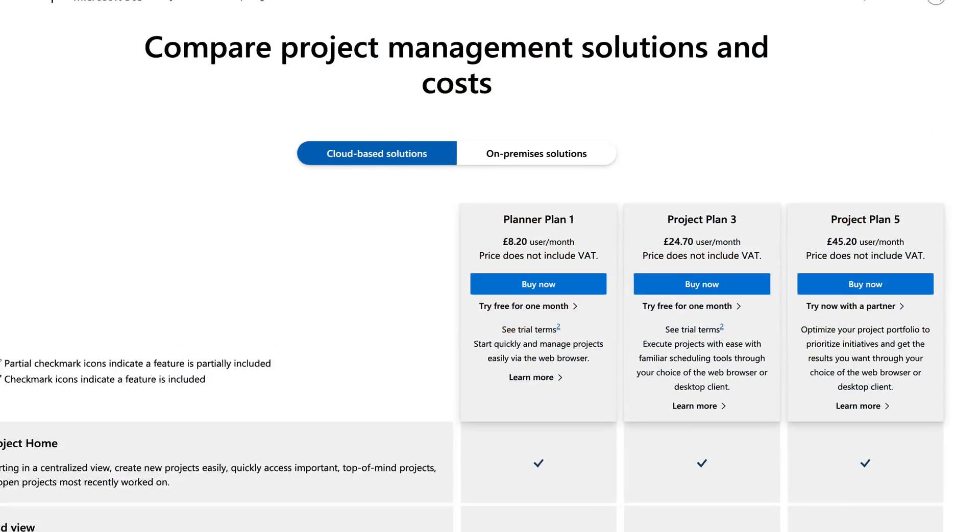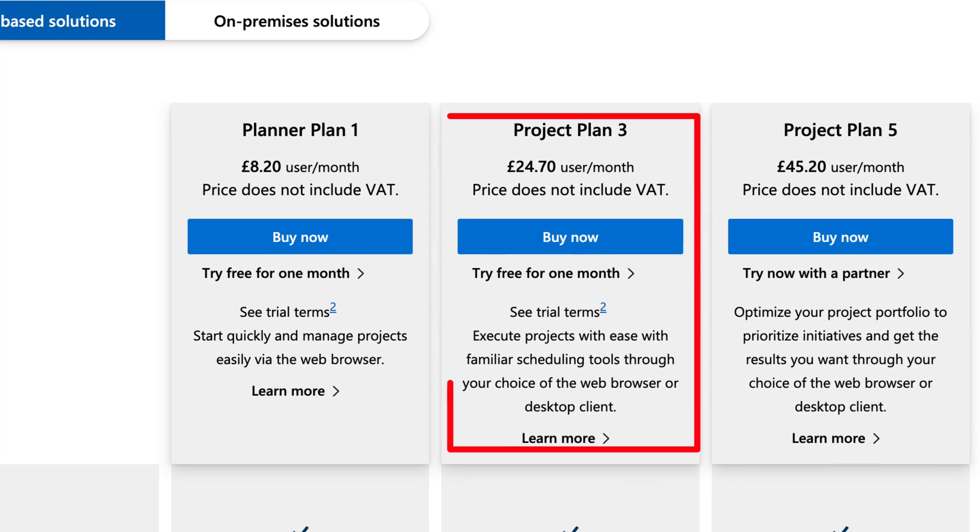So let's consider licensing. How does this new platform work with regards to licensing or using Copilot inside of the new Planner? Well, unfortunately, it does require additional licensing. You will, of course, need the Microsoft 365 Copilot licence to use Copilot across Microsoft 365. In addition, you'll also now need Project Plan 3 to access it, which comes at an additional cost over what you would need to access Planner Premium. So with that in mind, at least right now, the copilot's experiences may be reserved to certain people within your team or organisation. Yes, if you have people that are managing the plan, creating tasks and more, well, absolutely, this may be valuable to them. Would a project member? Well, it's unlikely they'll need to use Copilot because they wouldn't be using the capabilities that we've seen that Copilot provides today inside of the Planner Premium experience.